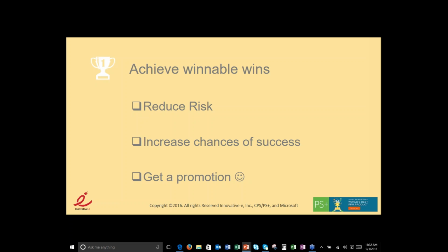The problem with that approach, without stopping to look at each of those things, is that you may be setting yourself up for some problems if the things on the top of that list aren't really winnable because they have a high degree of risk. So what makes a high degree of risk? Well, if it's very complicated and you haven't done it before, if it's going to be very expensive to do, if it's going to take a long time to do, these are the kinds of things that can add to it. So there are certain dimensions of project management, which we can talk about later for anyone who wants to, that are more complicated to do because of the adoption strategies and some of the technical complexities behind them than other dimensions.